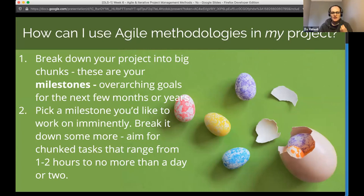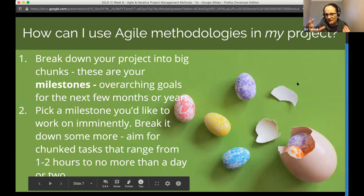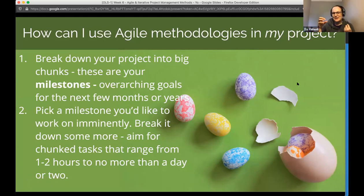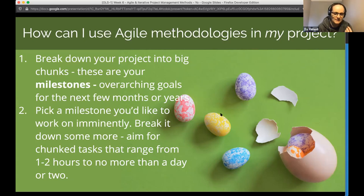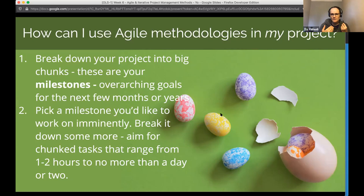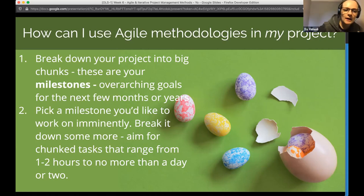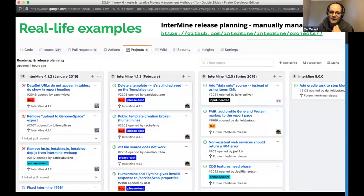How might you use this in your project? Think of a large milestone — some main goal — and break it down into smaller tasks. I'd suggest getting those tasks to between one hour and a day or two. If a task is going to take more than a couple of days, that's a sign you can't estimate how long it'll take because it's made up of many things you might be forgetting. Always break it down until you can easily estimate the time.